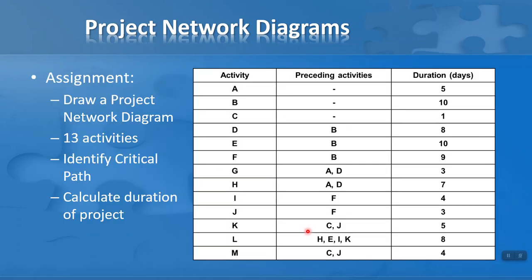In your assignment for this lesson, I'm going to give you information and ask you to generate a project network diagram based on 13 activities. Draw the diagram according to the rules we've covered — there will be bursts and merges, so watch out for those. Once you've drawn the diagram, add in all the durations in days, identify the critical path (there are several through this particular project network diagram), and then calculate the duration of the project.